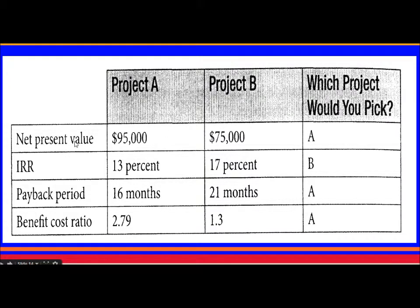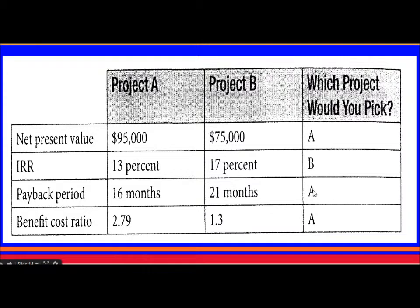Let's review examples comparing two projects. For NPV, the higher value is better — here $95,000 is greater than $75,000, so Project A is selected. For IRR, the higher rate is better — 13% leads to selecting Project B. For payback period, lower is better — 16 months is less than 21 months, so Project A is selected. For benefit-cost ratio, higher is better — 2.79 is greater than 1.3, so Project A is selected.